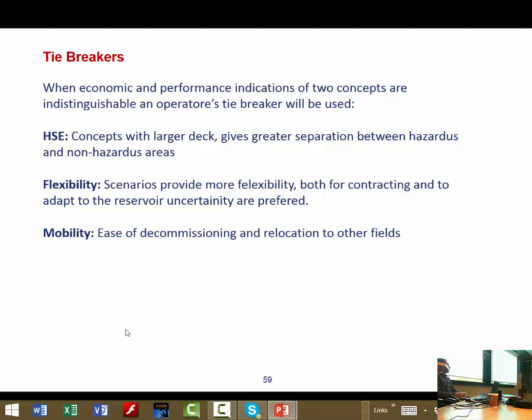What, in China or in Korea? In China, COSCO, yes. They've never done this before. It was their first experience, and it took 1 year longer than expected. And the project was also 1 year delayed because of the change in government in Italy. And now the project is 2 years behind schedule.